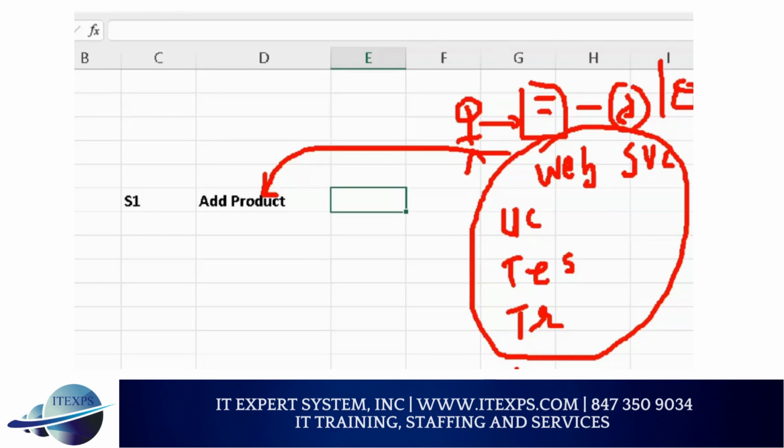Make sense? So if you have more tasks, it will take more hours. Yes or no? Listen carefully. If you have more tasks, then it will take more hours. So if your hours are 200 hours, just an example, then that story point is not right. The story point, our common language was 1 point means 1 or 2 days, 1 or 2 people. If that's the situation, right? So 2 people means how many hours do I get in 2 days? One day I have 8 hours. 2 days means how many hours do I have?